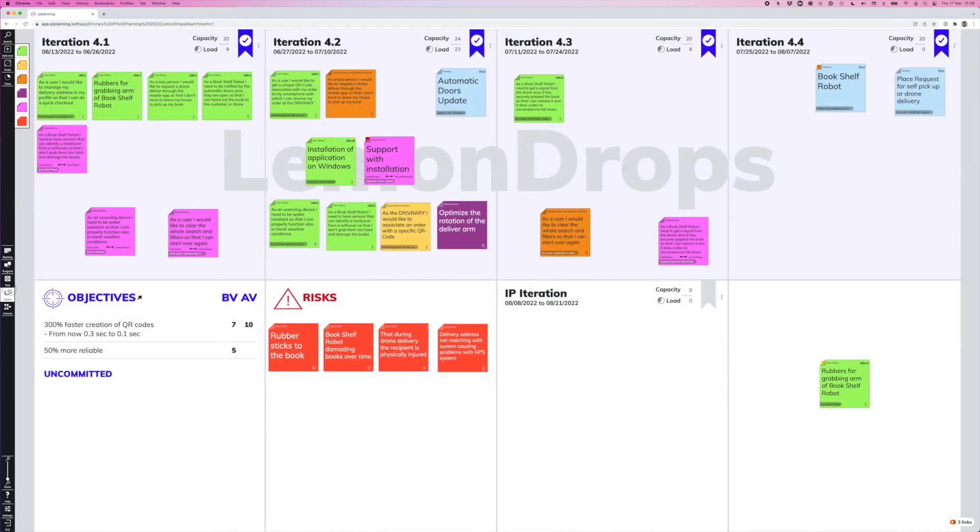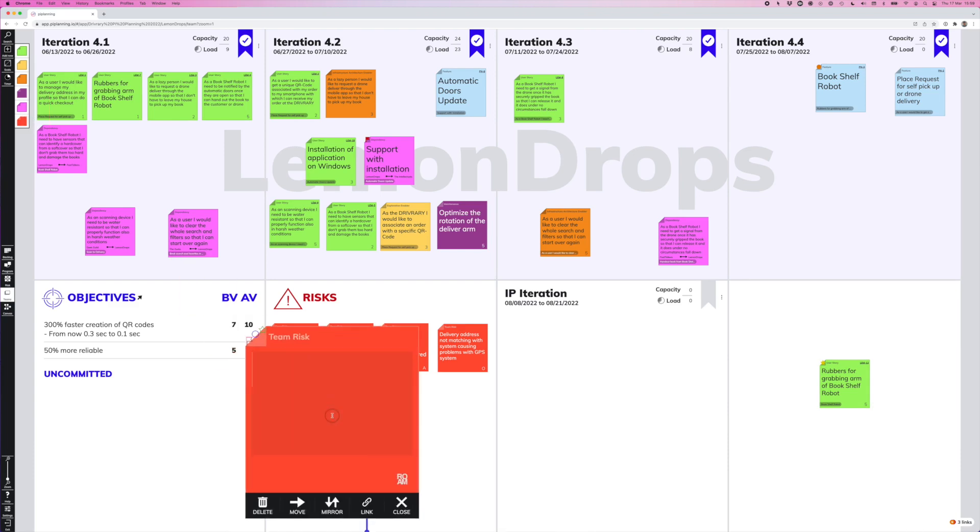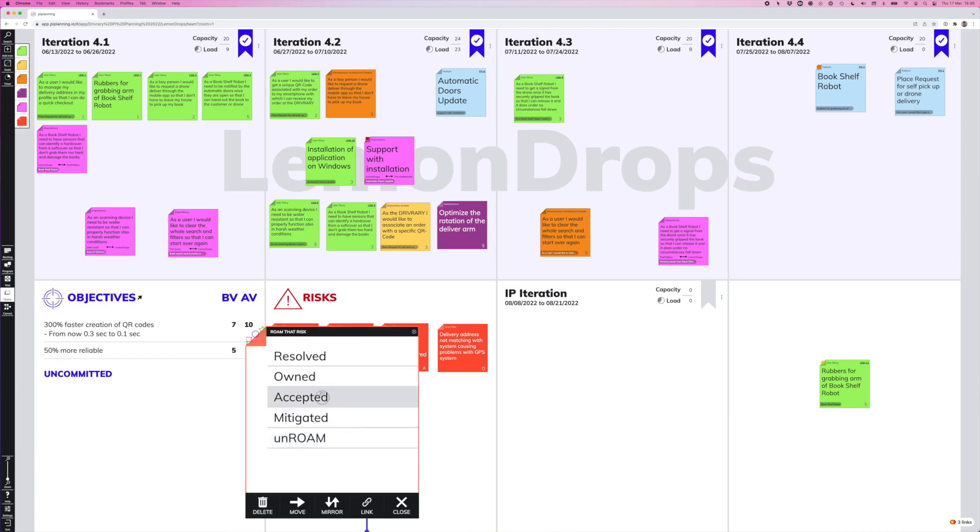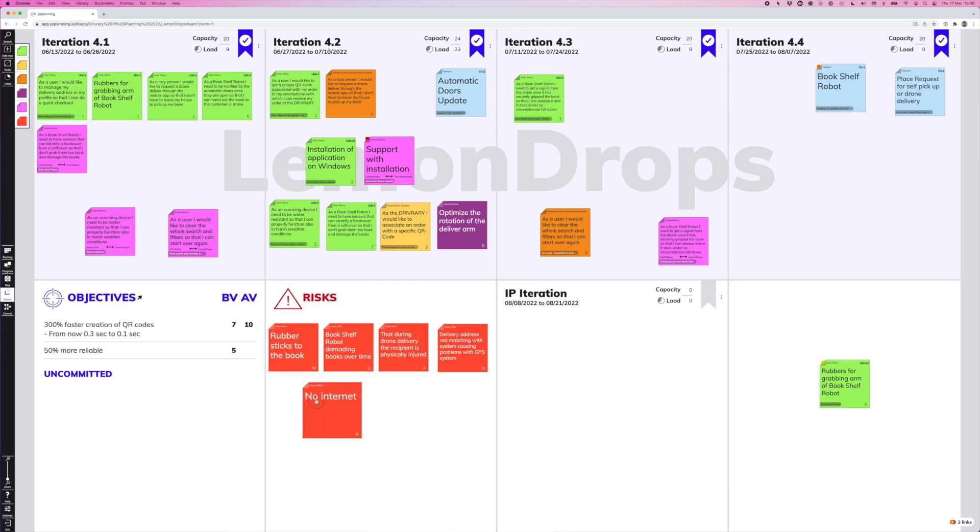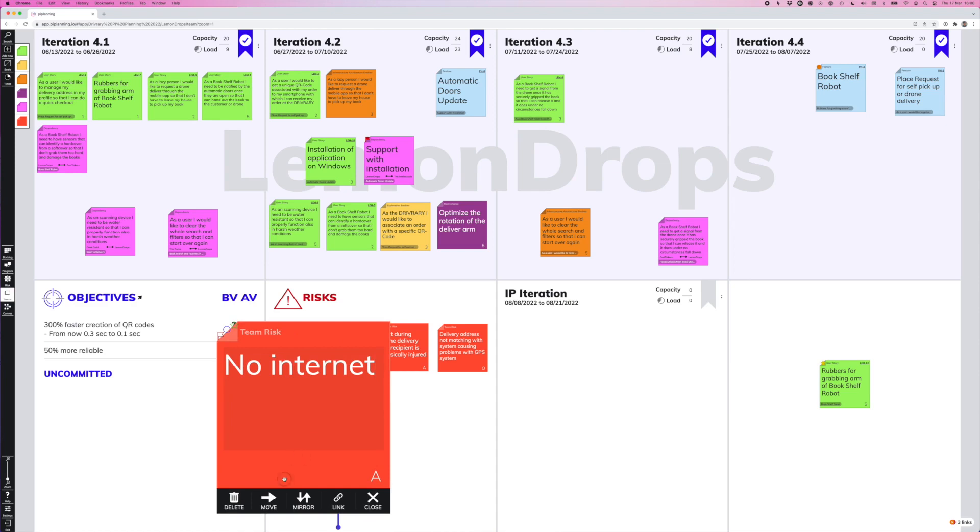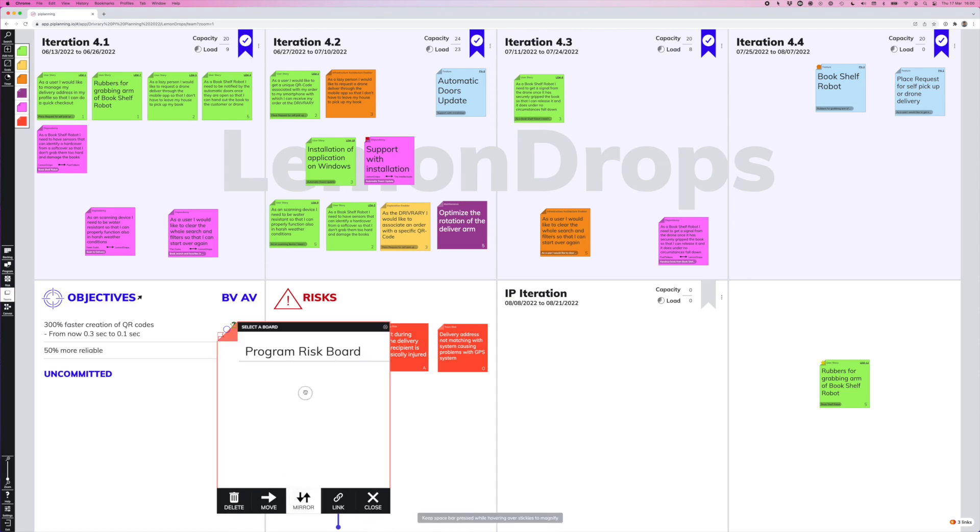So let's go back to our team board. During team breakout session, teams may also identify risks. And risks we can bring to our attention in the risk area. So here again, we can create a risk sticky type. We can write down what risk we see. And the specialty of the risk sticky type is that we can click down here on the ROAM button and set the label for resolved, owned, accepted, or mitigated right here on our team board. Or alternatively, we can also say, hey, this is a risk that we need to bring to the attention of the whole train. So in that case, we can just mirror the risk to the program risk board.